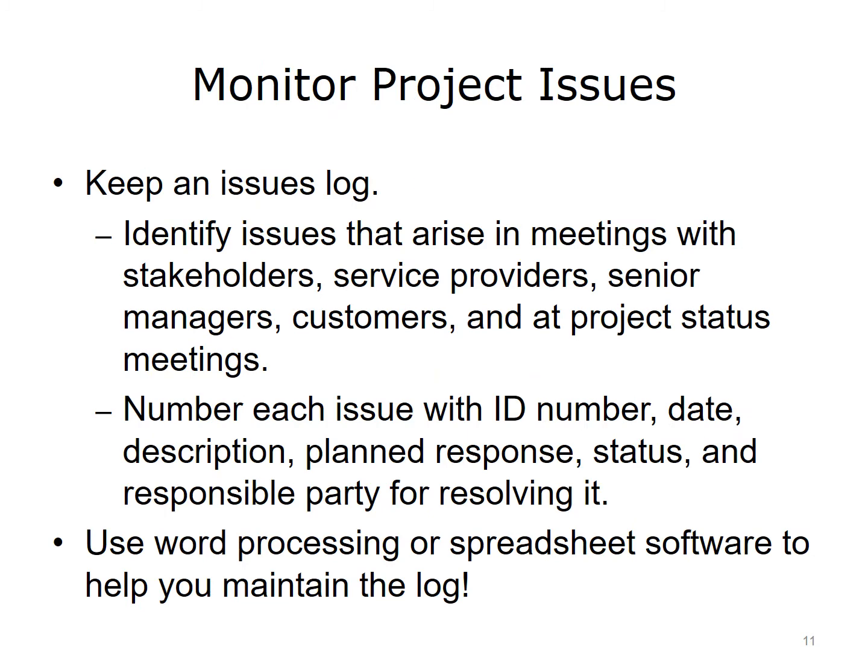As you monitor your project, an issues log can help you keep track of problems, both small and large. As you identify issues that arise in meetings with stakeholders, service providers, senior managers, customers, and at project status meetings, include them in the log. Assign each issue an ID number and include the date, description, the planned response, and the person responsible for resolving it. Update the log as the issue is resolved.